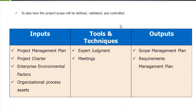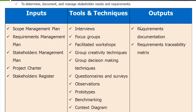We saw some PMI resources in terms of templates for scope management and requirements management. The next step is to collect the requirements. The inputs are the scope management plan, requirements management plan, stakeholder management plan, project charter, and stakeholder register.